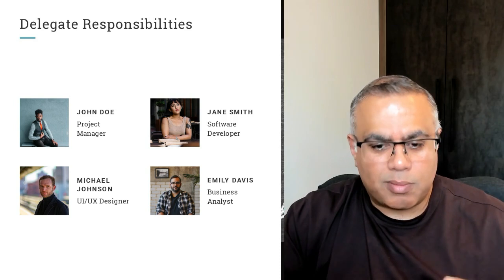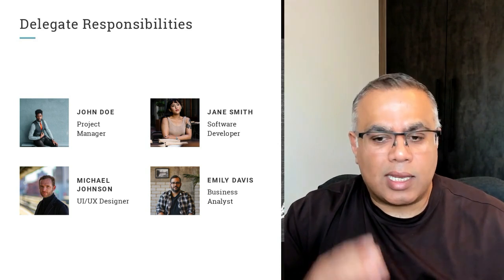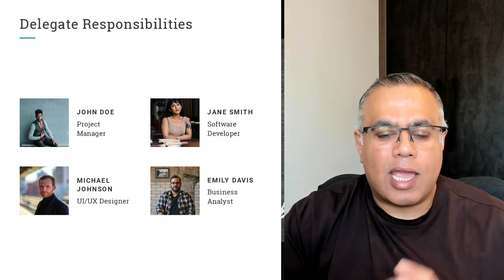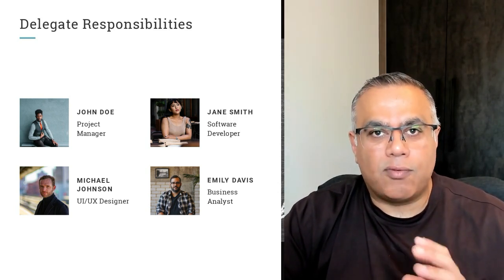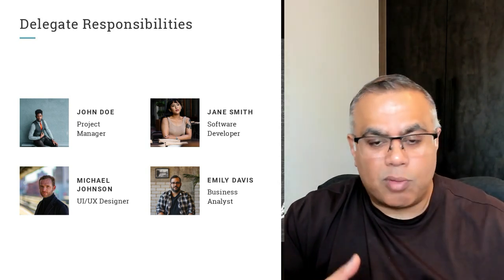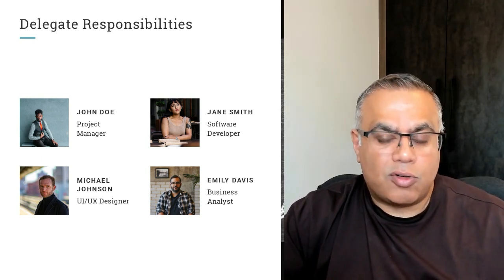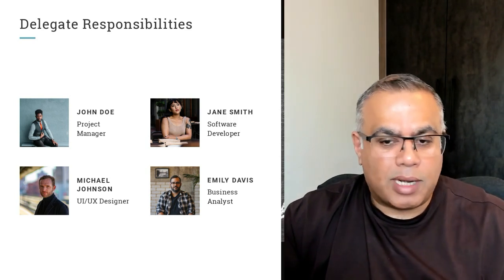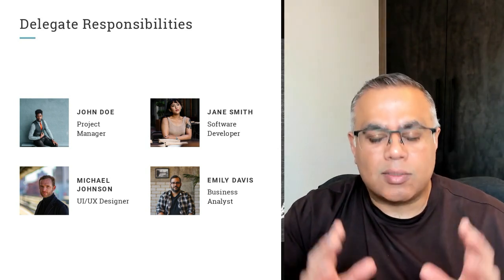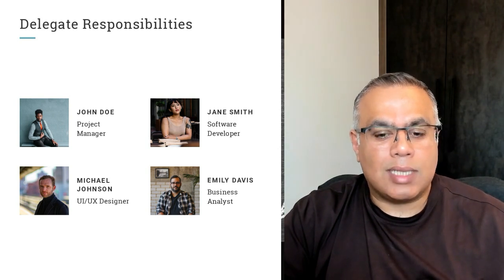So your role as a project manager is to assess the overall project and understand how it all fits together and keep all the pieces moving, not to do all the work. However, try and avoid this as much as possible, because unfortunately, you will then have to let something drop, i.e. either monitoring the project or managing your stakeholders. You don't have the time to communicate. You're firefighting, trying to get things done, because you can't balance your project management responsibility against your actual doing activity. And that's where you get into a dangerous position where you start causing delays.